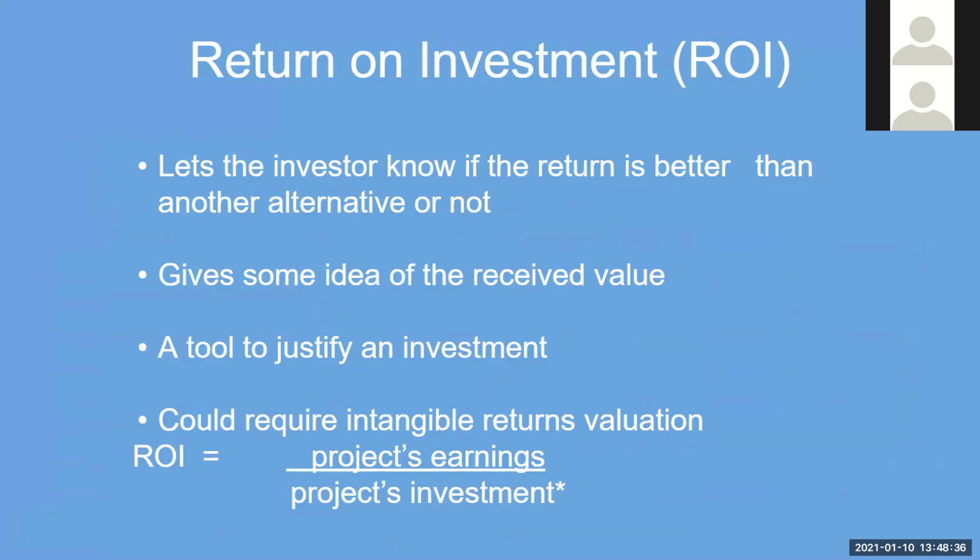All right. The other approach, which is a little bit more meaningful, is the return on investment. So we spent $1,000 for this project, but what did we get back in return? Did we get 1,000 or 2,000 or 500? That tells us how efficient and successful our project was. The TCO does not tell you that. It just tells you everything you're going to spend, so you know the limit to spend. But it doesn't tell you if that spending was a good, wise decision or not. The ROI would give you that idea.